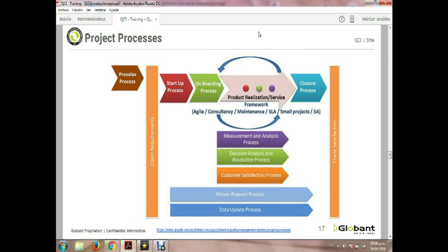There are processes for the entire project administration, from its beginning and throughout its life until its closing, which are generally executed by project managers. These are the startup process, data update process, and closure process. Once the project is created on the internal tool, team members can be assigned to it. The onboarding process aims to provide each Glover with information about the tools, courses, references, details of the project, the roles, responsibilities, and objectives in the project, among others.